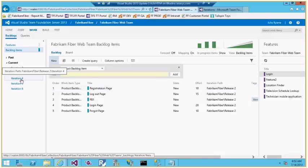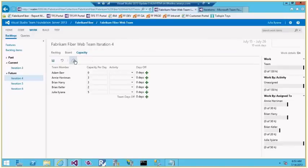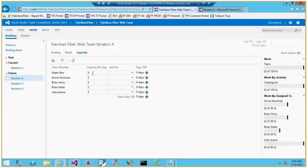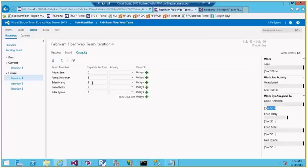Let me plan for Iteration 4. I can copy capacity information from the previous iteration or type it in manually. This iteration runs for 10 days. For example, Amy will work 5 hours per day with no leave or holidays, so that's 50 hours. I define the individual team member capacities similarly for the rest of the team.